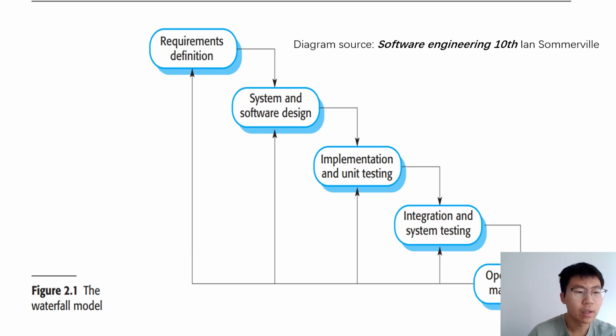In the construction industry, the waterfall model is ideal due to its linear approach. For example, when building a new office complex, the project manager gathers all requirements, architects create detailed designs, and construction follows a strict sequence. Each phase must be completed before the next begins, ensuring clarity and precision.